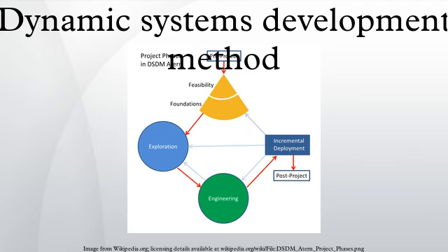The first 2 stages, the feasibility study and business study, are sequential phases that complement each other. After these phases have been concluded, the system is developed iteratively and incrementally in the functional model iteration, design and build iteration and implementation stages. The iterative and incremental nature of DSDM will be addressed further in a later section.